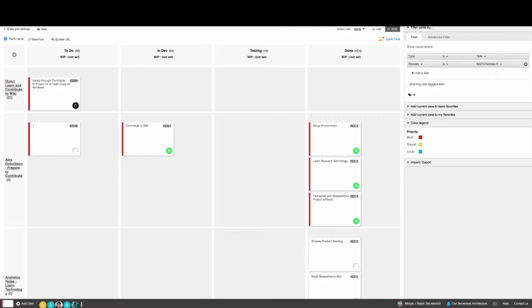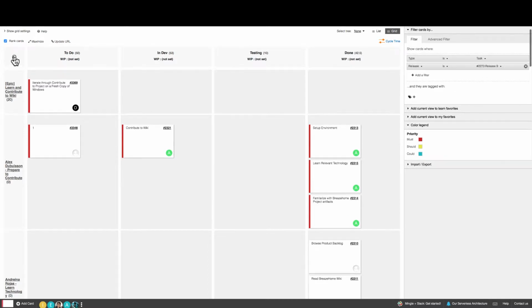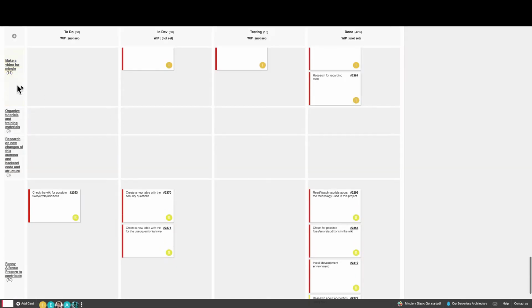Tasks are used to break down user stories. They represent the smallest unit in a Scrum to track work. Tasks are created similarly to the user stories. First, you add the user story as a row by clicking on this plus sign. Notice that if you type the title of your user story, this will appear as an option. Scroll down the page to find it.